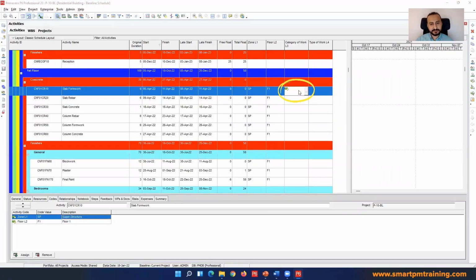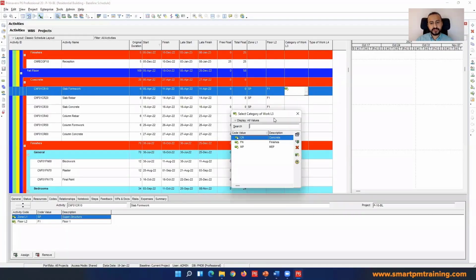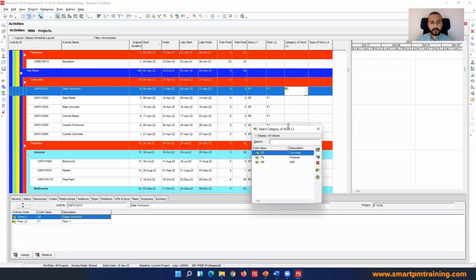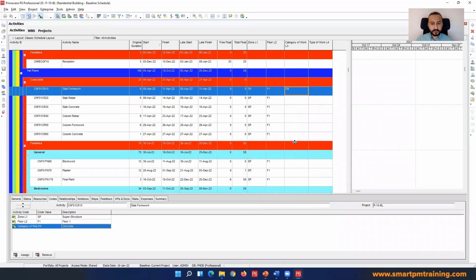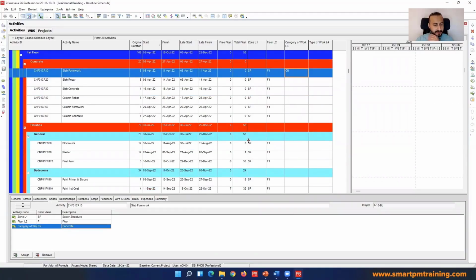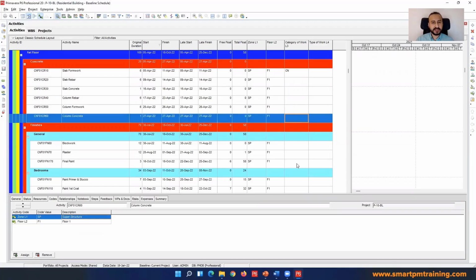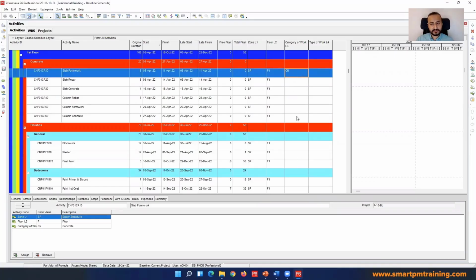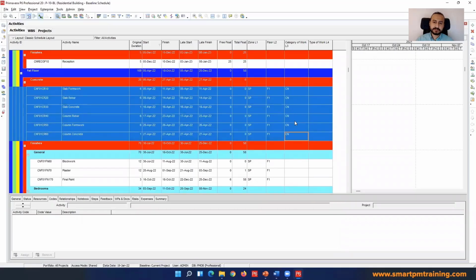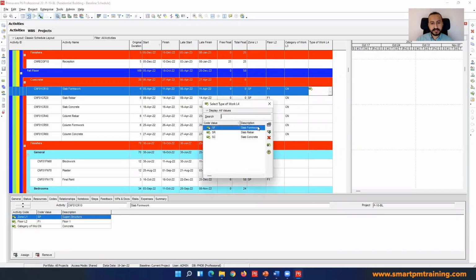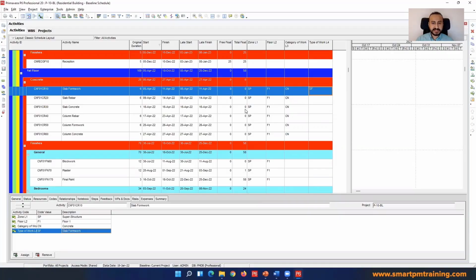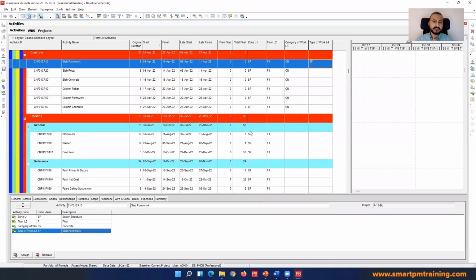What about this level? It's a concrete, finishes and MEP. So to recap what we have, we're gonna have SP superstructure. Under superstructure, I have first floor. Under first floor, what else comes next? It's gonna be concrete. And where my limitation here, it's actually up to here, because everything after that is finishing. So I'm gonna have concrete. Okay, and that's my slab formwork. So can you see what's happening here? It works like a funnel, right?